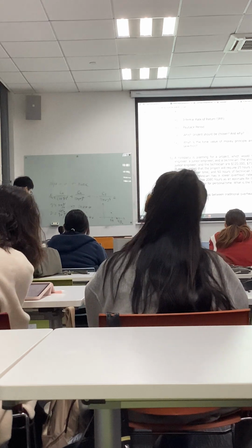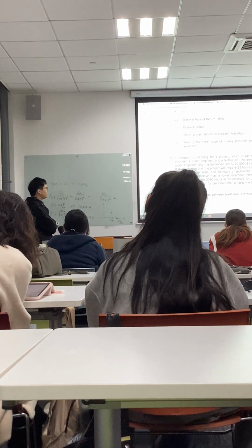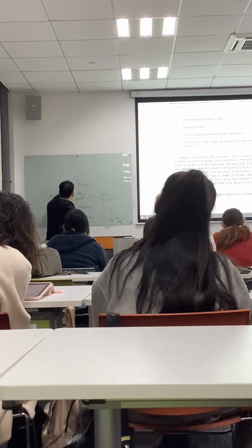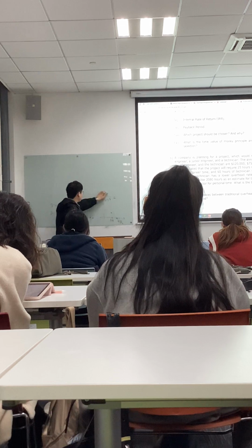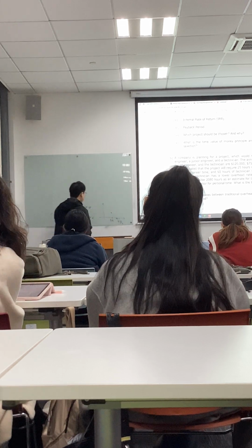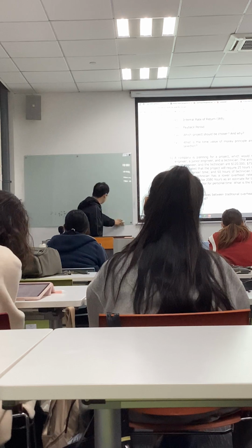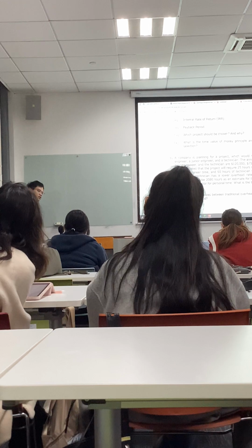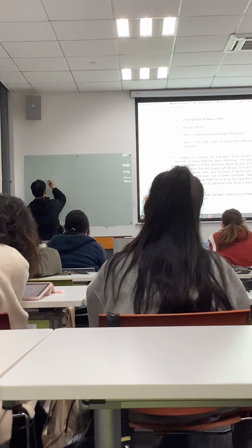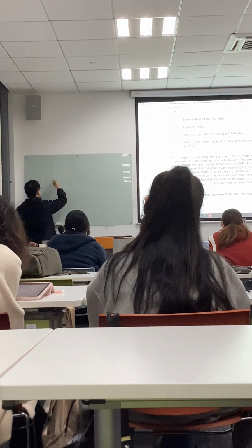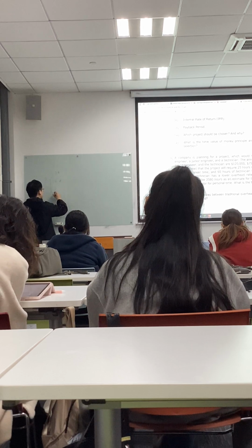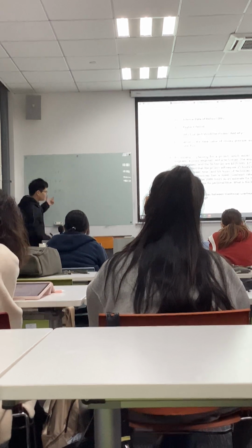So this question is essentially an ABC costing question, right? The three types of staff, senior, junior, and technical, are actually three cost drivers, right? Three cost drivers. And the project needs 25 hours for the first person, 40 for the second, 60 for the third.